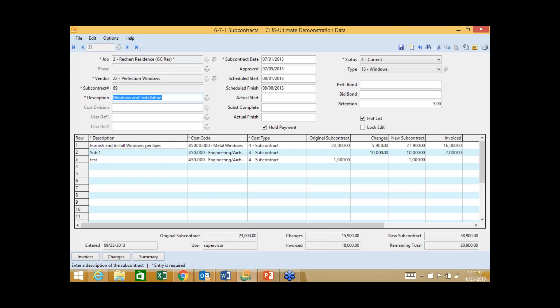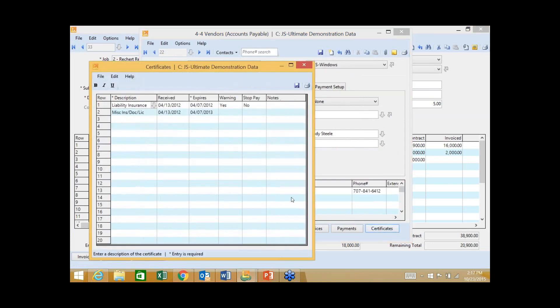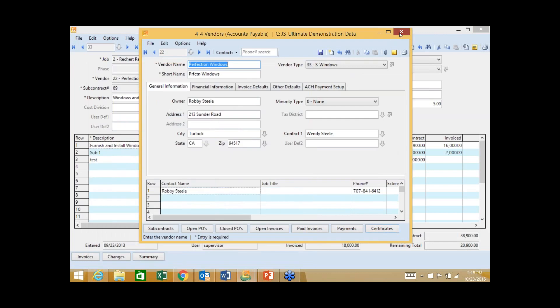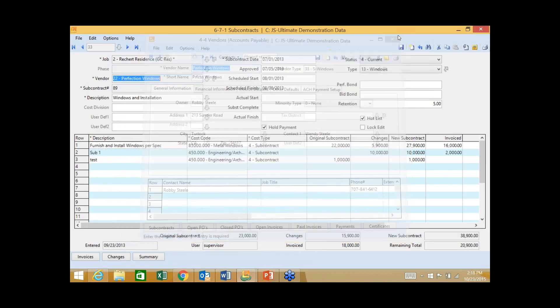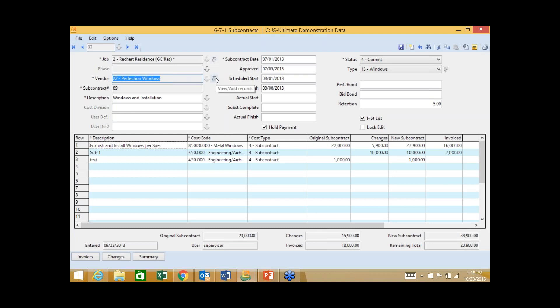The first thing is when we talk about vendor controls, different than cost controls, we talk about managing this vendor, perfection windows. The first thing we can do is track certificates of insurance and actually be proactively warned if someone has an expired certificate of insurance. The other thing we can do is assign this subcontract to a job and quickly and easily produce logs for subcontracts, either at the job level or at the vendor level.